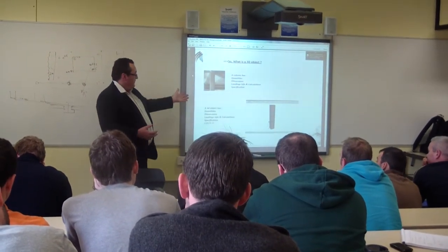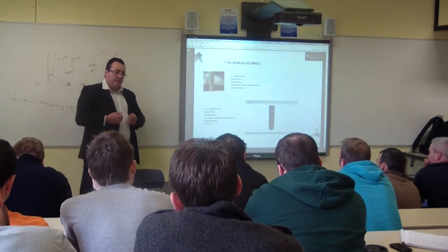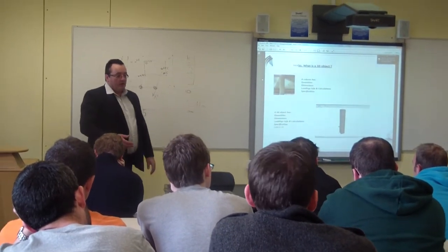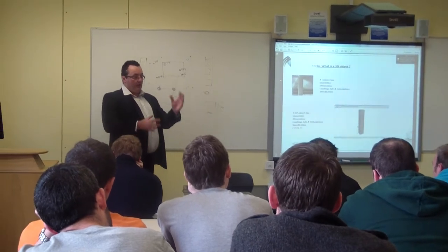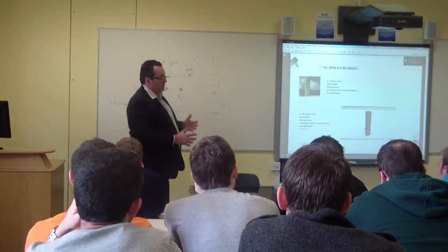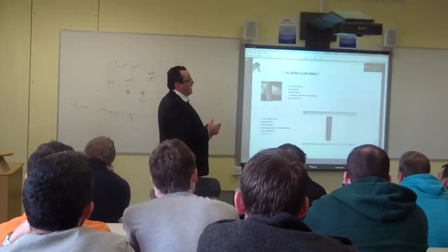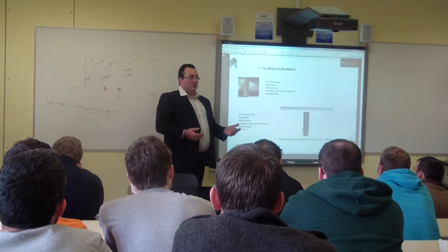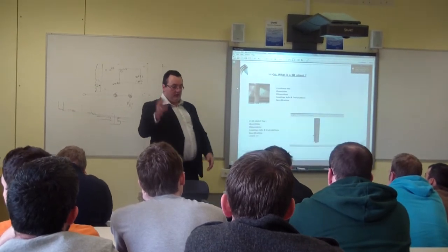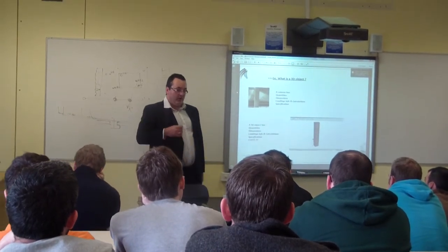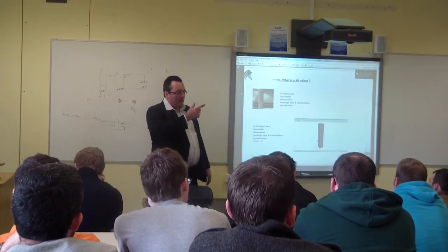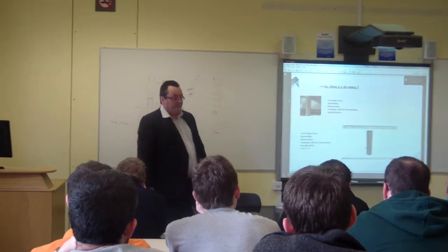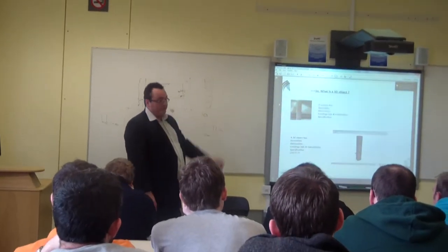and they put their information in there, but you have to extract that information. Different tools are doing that. Pictura has one at the moment called Cosmos, where you can take in 3D objects and cost them up. Now, to cost it, you use your own database, or you can use what we call SPONS, which they use in the UK and Ireland, and also RS Means. And that's how you cost it up.